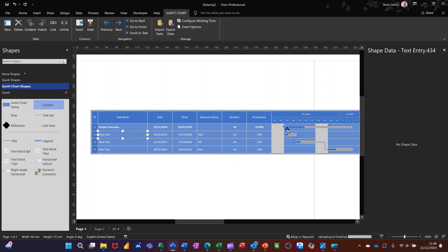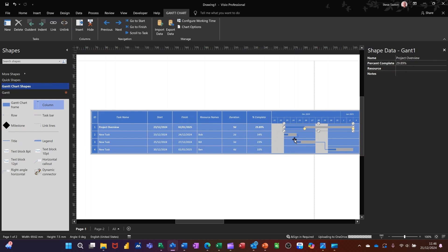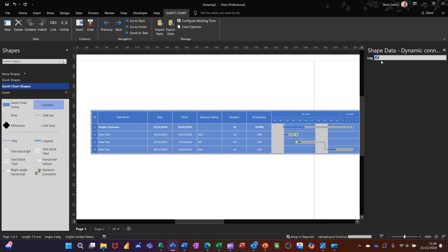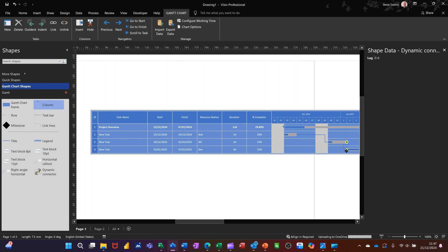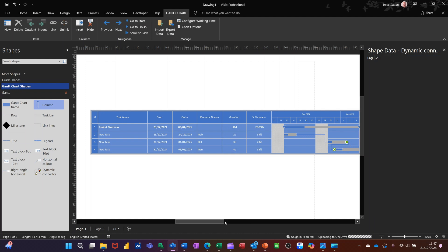The percentage complete is there. If you actually click on the line you can actually do lead and lag. So I've clicked on the line, you've got lag zero days there, but if I put three day, see what happens there. Three day lag on this one. I'll click on that one and put a minus number in there, so minus two. That's a two day lead time, you can see it coming back on itself there.